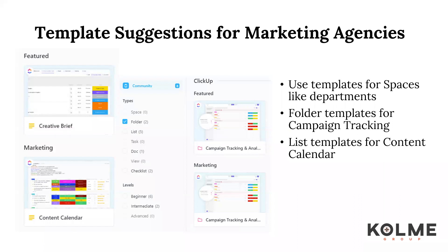Templates can help your agency repeat successful processes, both saving time and maintaining consistency throughout the organization. It can be useful to templatize spaces for operations departments. Folder templates can help create a team member directory, project workflows for CRM, content development, or social media posts. Template lists for service types such as ad campaigns, blog posts, and other content, and also for content type such as a blog, email, or SEO. Make task templates to keep project structures consistent for every team.